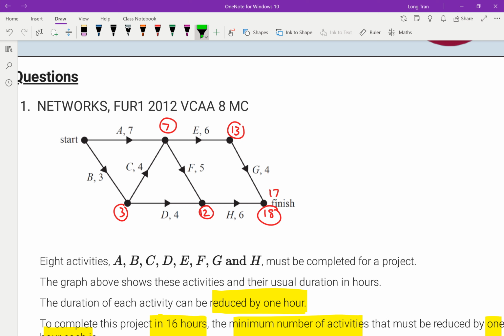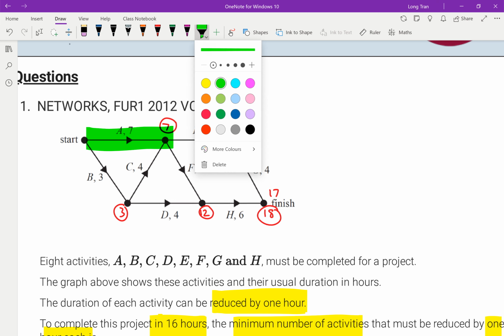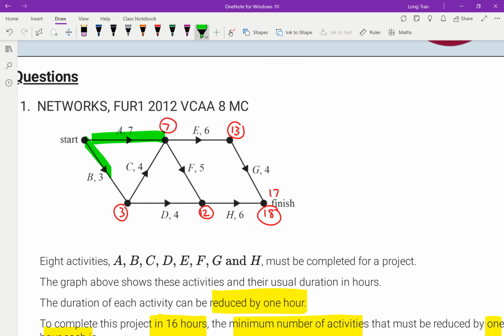So I would have to have gone either A. Let's do it a bit smaller. So A. These 3 are critical because they can all still get to that point at 7, right? But from here, once I've got 7, I need to go down to 5 and then plus 6. So 7 plus 5 is 12, 12 plus 6 is 18, rather than taking this route. This route doesn't get me to the best account. So that means the minimum time required clearly is 18 hours. Okay, so that's my minimum time required.